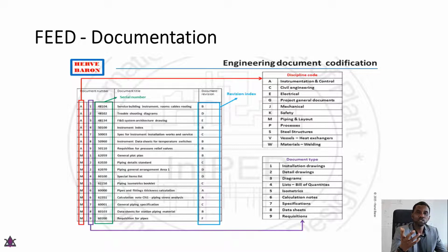So typically in most standards, documentation can be based on the title, a number, maybe an alphabet to indicate maybe a unit or which discipline is responsible for it. You also have the revision number. For example, a drawing may be worked on 3 times, 4 times, 5 times.